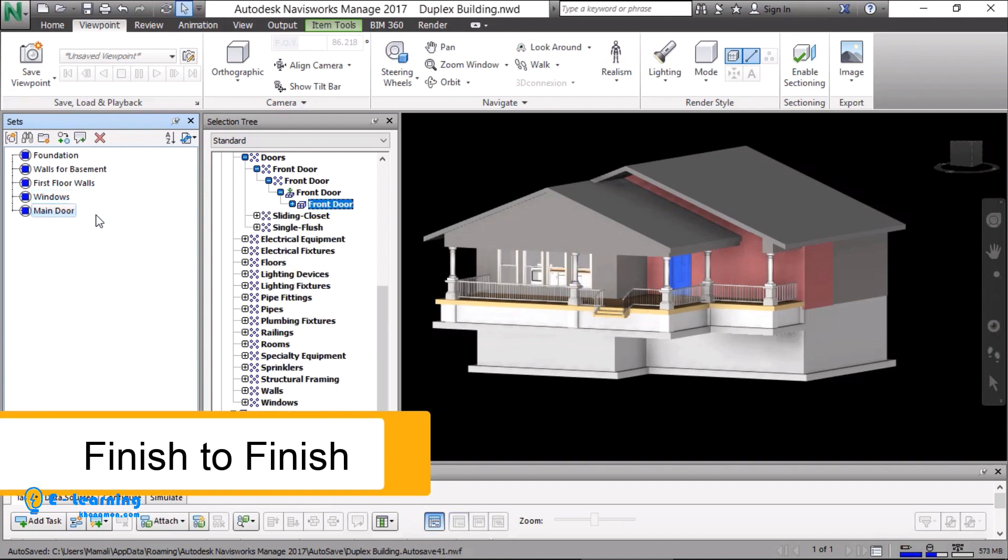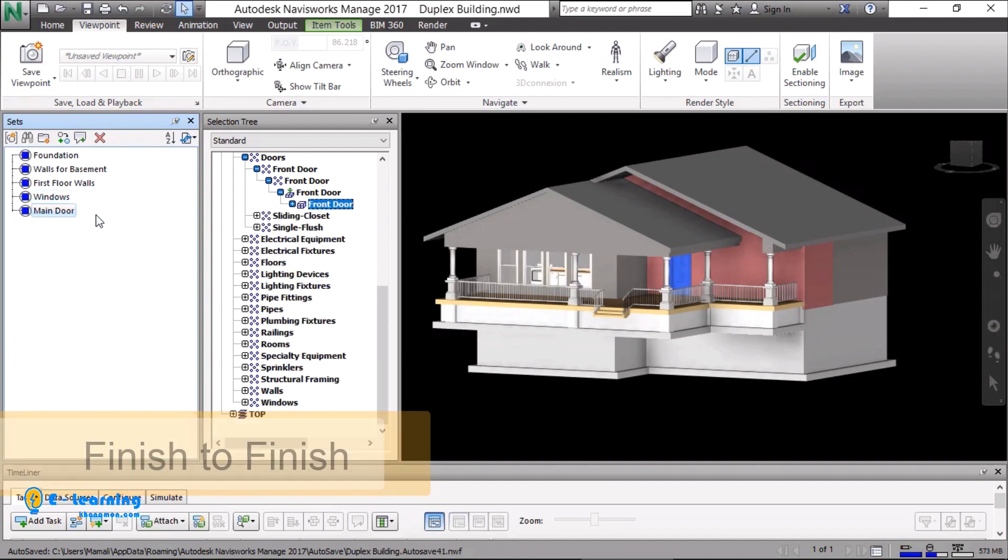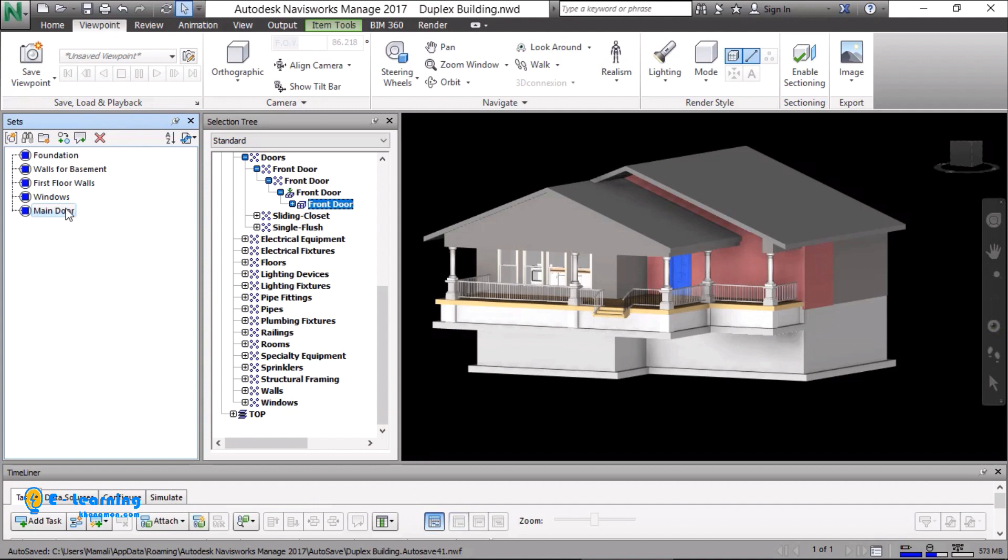Finish to finish: The finish date of the doors and ball straight installation should be the same, because the same team is working.